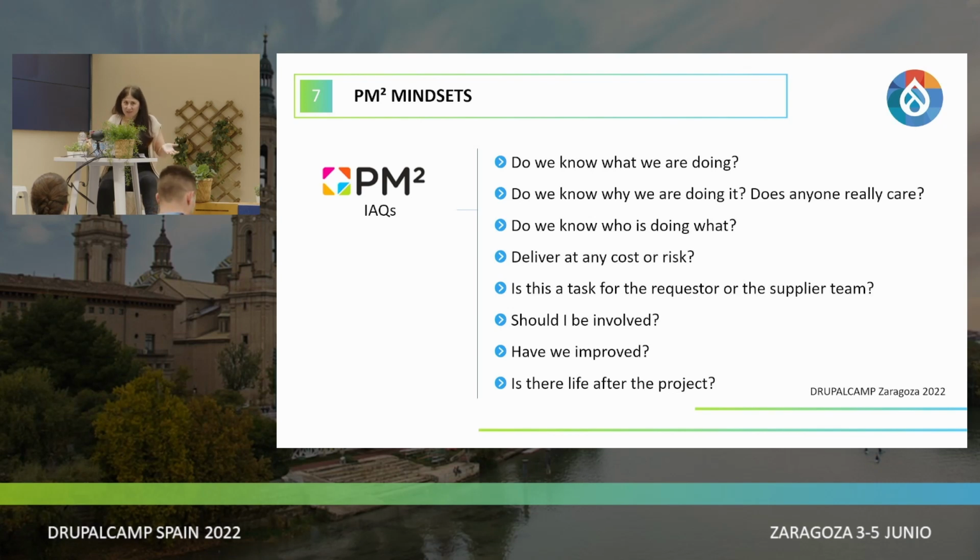What is happening after the project? Because this is also something we need to take into consideration. You know, is it going to be maintained by us or not? Because if it's not, maybe I forgot to put specific documentation in order to do a handover to another team. This is very important, but we tend not to think about what is happening after.